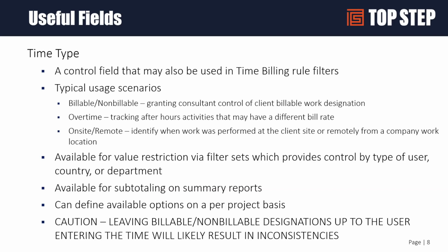Now, with all of that said, I put a big caution at the end of this. If you allow your users to decide what is billable and what is not, you will likely result in inconsistencies on how your billable time is reported. When I'm working with clients, I consistently recommend that they do not use this field for billable, non-billable status.